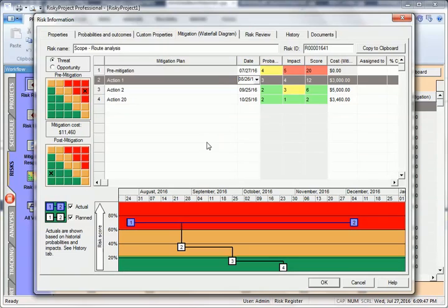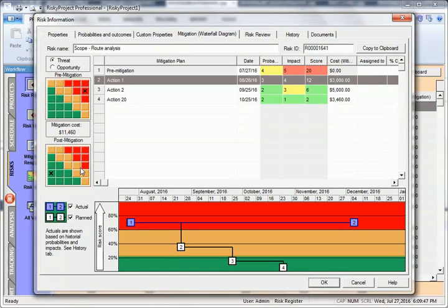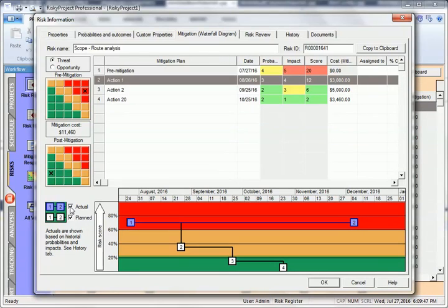The impact of the risk mitigation plan is also reflected on the post-mitigation cube. As you add activities, the cost and cumulative impact of the plans is plotted on the chart along with the total cost of the mitigation. The waterfall diagram shows both planned and actual changes in risk score. Actual changes in risk score are taken from the risk history presented in the risk history tab.